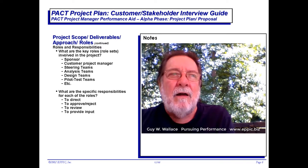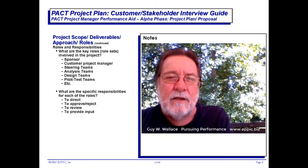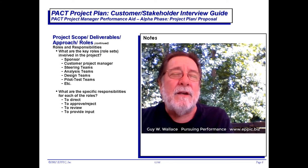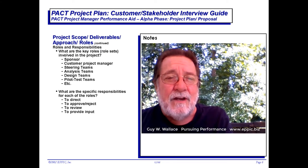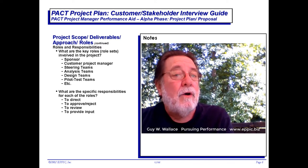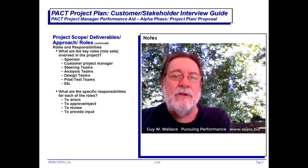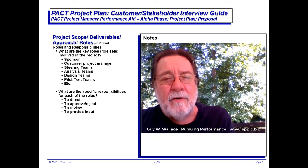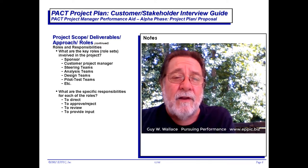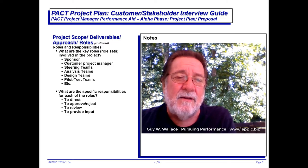When people tell you 'yeah, that's a fine project plan' and you know there's significant divergence in thought, you're going to have to work harder and more diligently to ensure a consensus on how to conduct the project. You want to find that out and nail it down as soon as possible — hopefully before you start — because otherwise you'll blow schedules and budgets running in circles, revisiting the same things over and over because everybody's thinking about this differently.